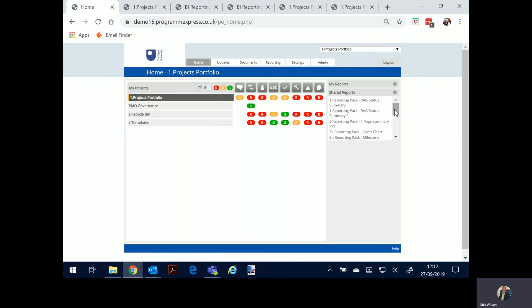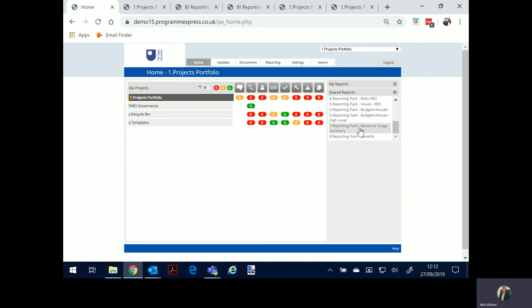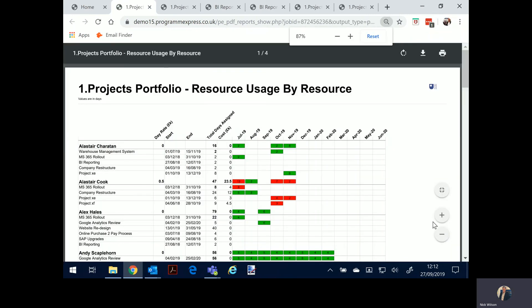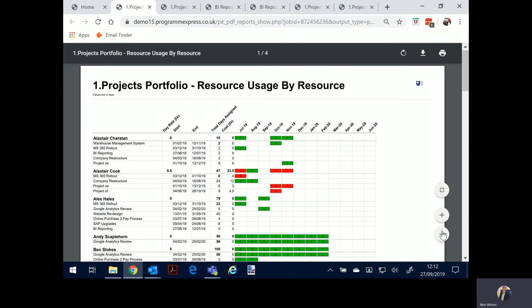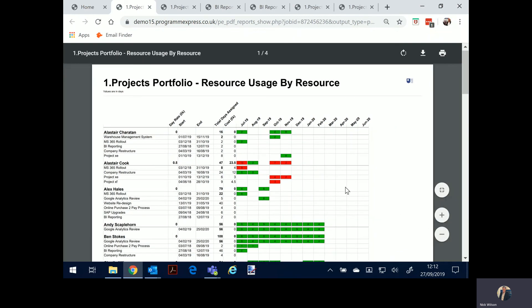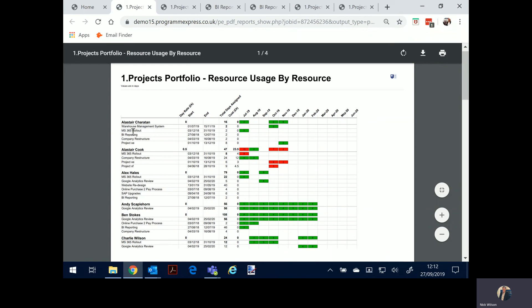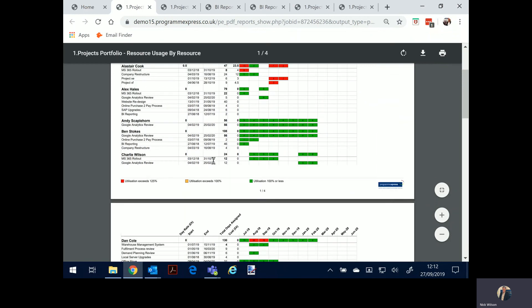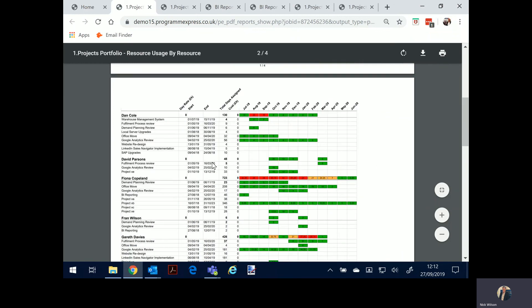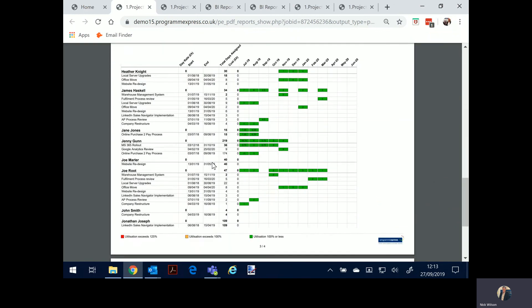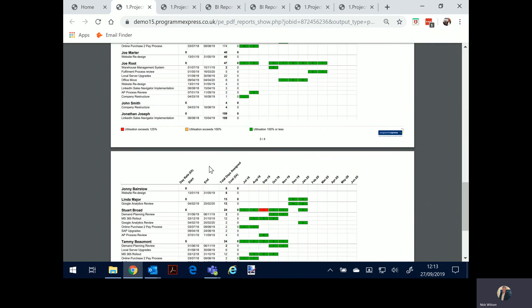So let's have a look at the resource usage summary at the top level. This is not a deep dive resource management solution but it replaces the need for Excel and resources are aligned to the plans that are set up within Programme Express. So as the plan changes the resourcing will change. So you'll see the resource, what projects they're working on, days in a period and whether they're over and under allocated. And a bit more on day rate, total days assigned to the project, etc. Very simple view of the resources, the health of them, whether they're over allocated.